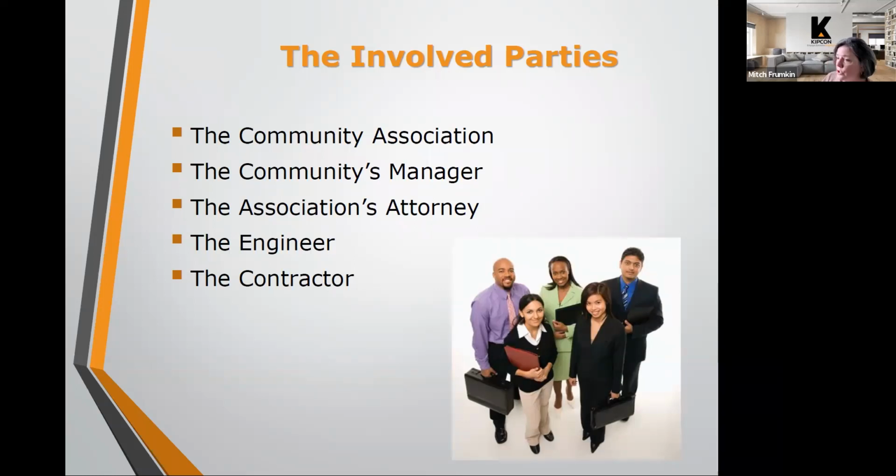The engineer, if you're having specifications prepared for a project, design specifications, you would have a contract with your engineer, and the engineer would be responsible to put together a bid package for you. And we'll talk about what's included in that bid package, but it also includes the design drawings that the engineer prepares. And then the contractor, obviously, to perform the work.